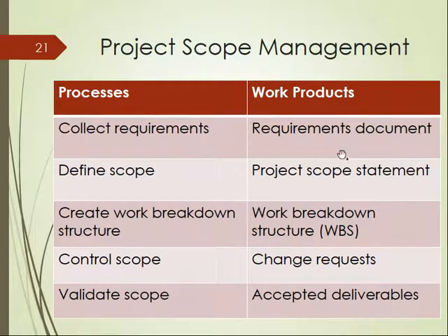For collect requirements, the work product may be the requirements document. And define scope, the work product would be the scope statement. And for the create work breakdown structure, obviously the work product is the work breakdown structure.